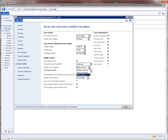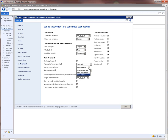The budget overrun default settings gives me the option to choose the system behavior when a transaction is about to go over budget. The various options are: disallow overruns, which means when a transaction goes over budget it will be stopped from posting; warn of overruns, which means the user will just be warned that they are going to go over budget; and allow overruns, in which case there is no warning and the transaction just goes through. For this demo, let's say disallow overruns.